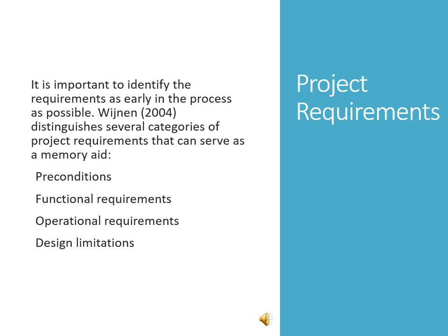The project requirements. It is in fact important to identify the requirements as early in the process as possible. Our friend distinguishes several categories of project requirements that can serve as a memory aid. There are the preconditions, functional requirements, operational requirements, and definitely the design limitations.